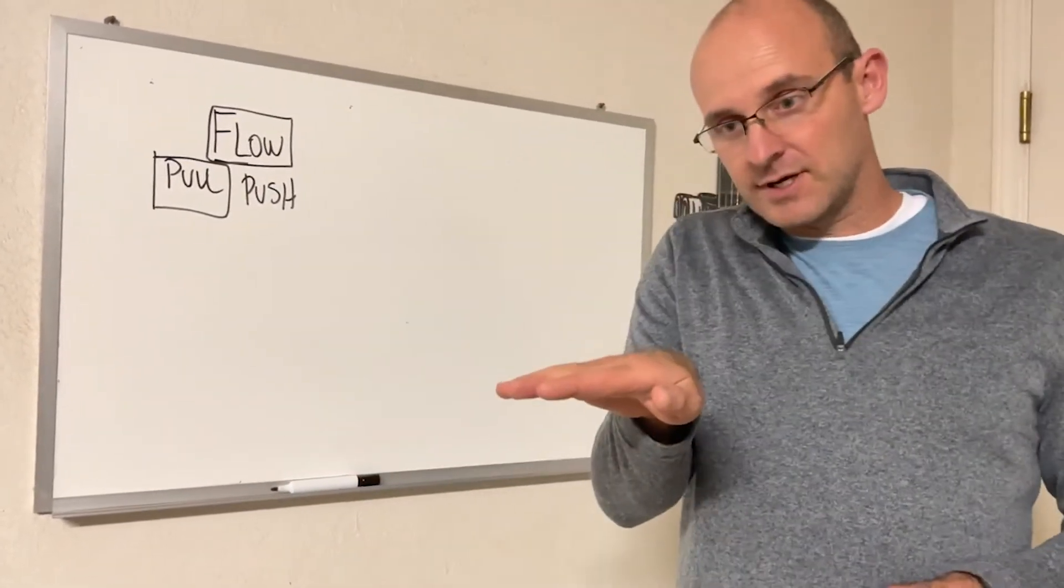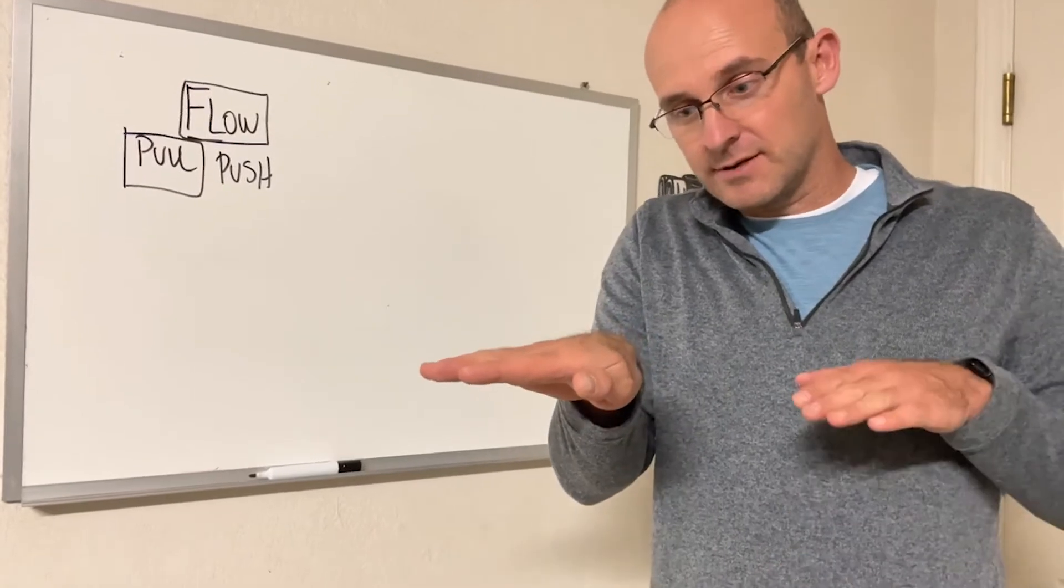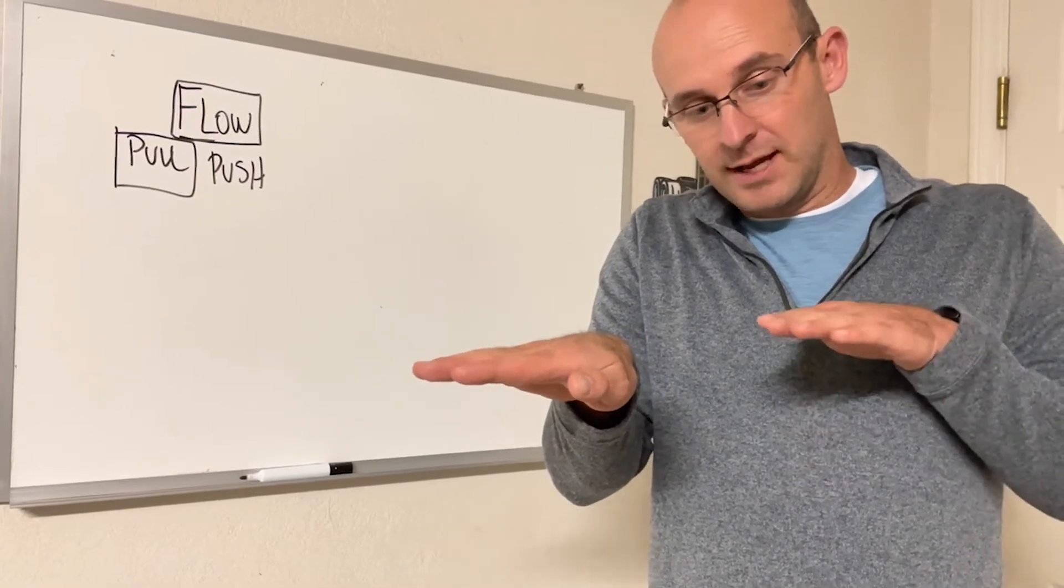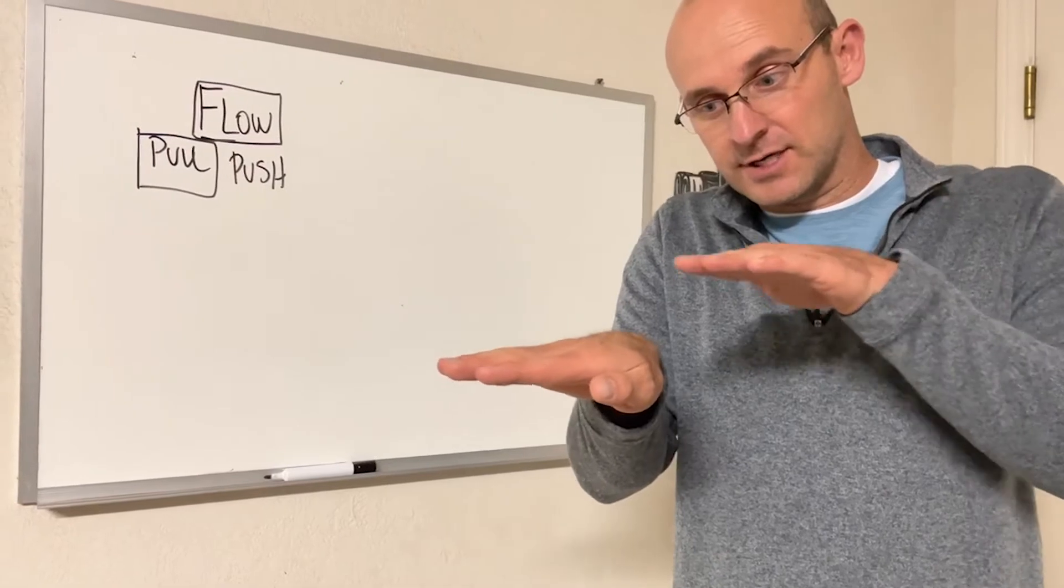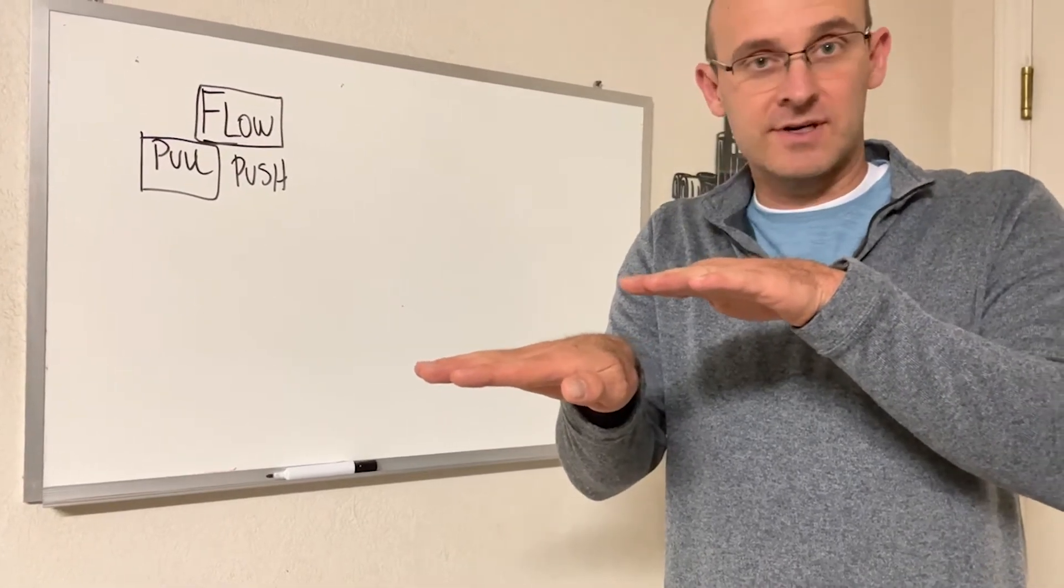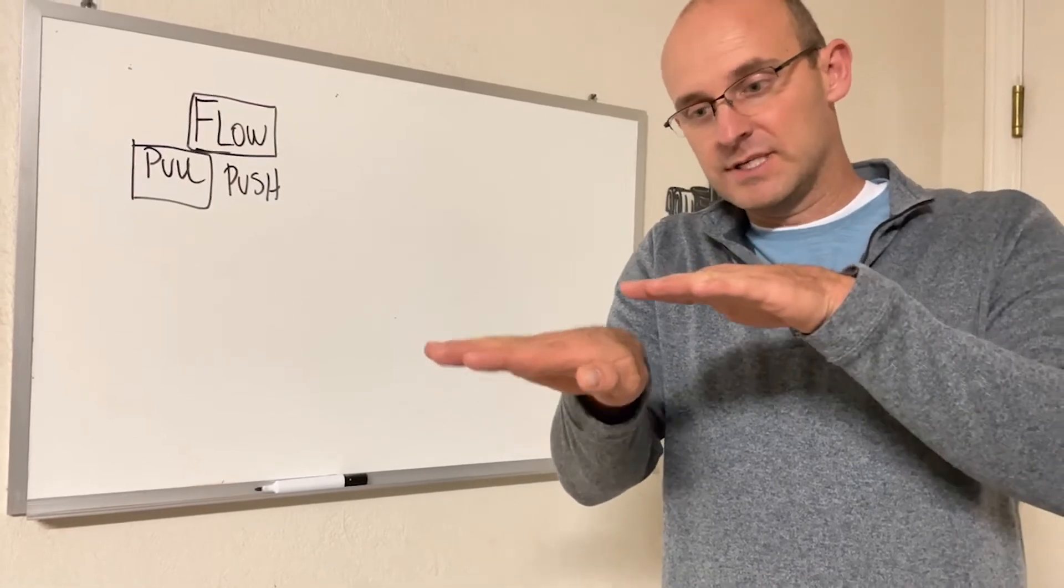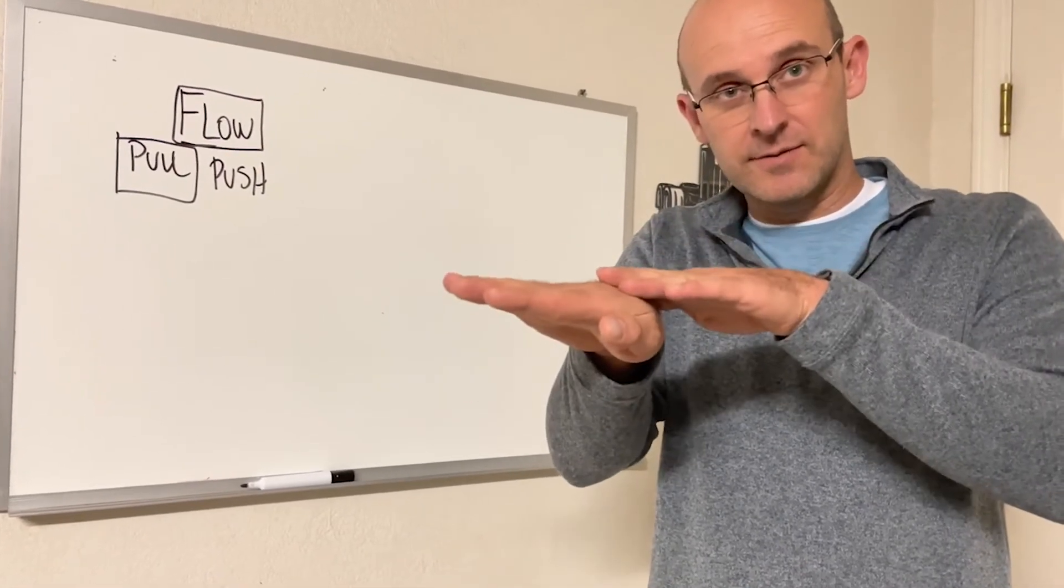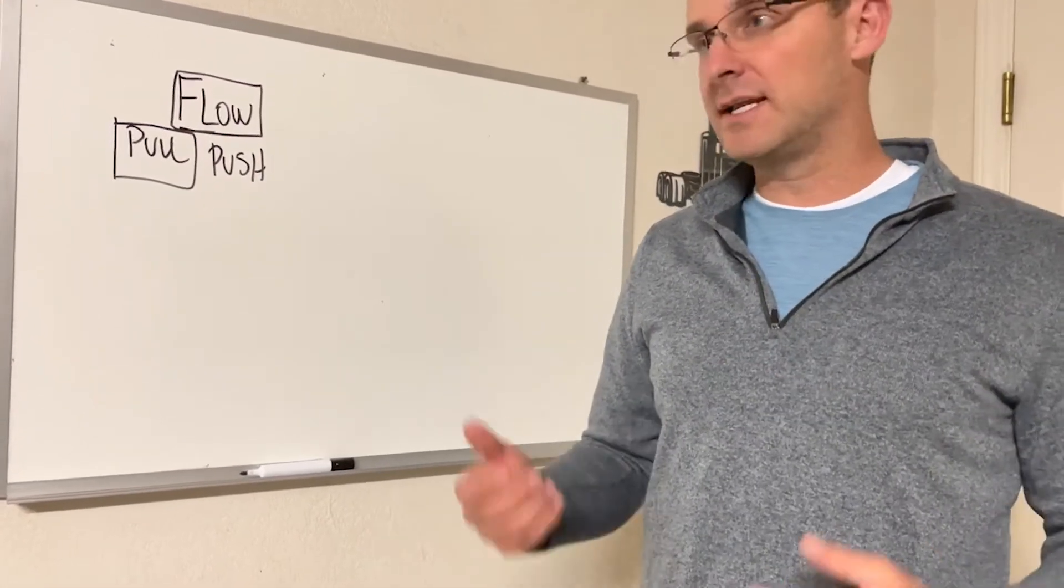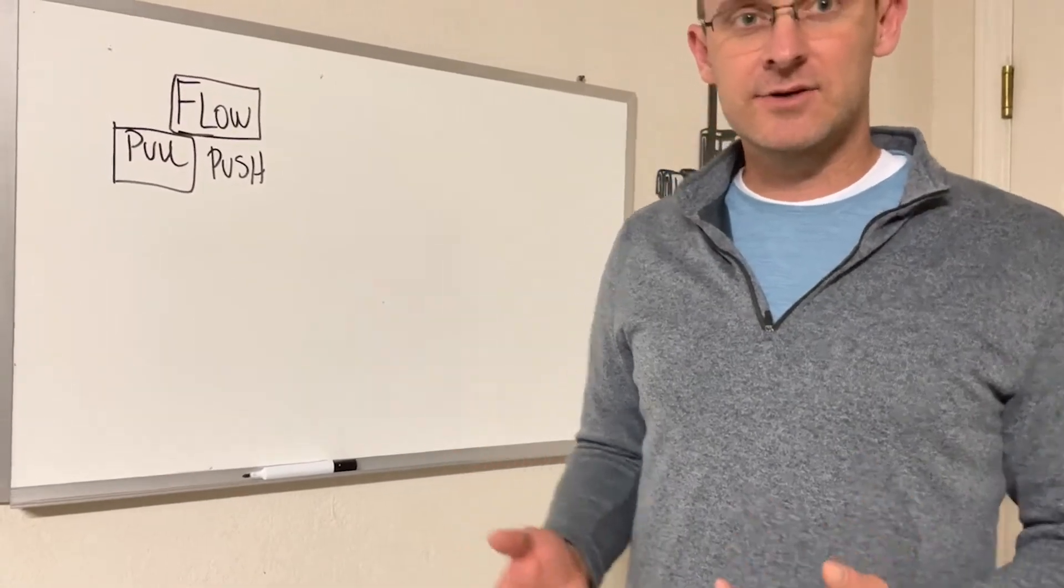And then push: that might be where this contractor is supposed to be done but they're not, but this work is supposed to start. And the general contractor will push, or whoever it is, it could be a multi-prime contractor or trade partner, will push these contractors on top of each other.